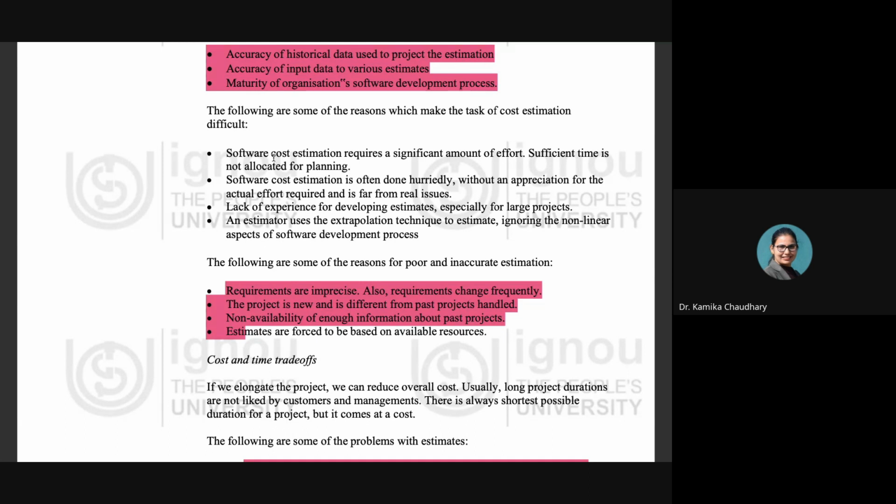So these are the 4 points which tell us the reasons that make the task of cost estimation a difficult task. Not a proper amount of effort is paid when we try to estimate the cost, the process of estimating the cost is made in a hurry, the non-linear part is not taken into consideration by the extrapolation techniques, and the lack of experience of the developing team can be another major factor that can result in a bad estimation of the cost.